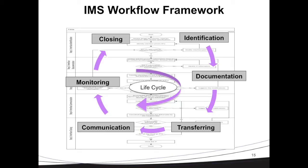Who is doing what, how many interface agreements are overdue, where are the bottlenecks. And finally, when all the agreements are closed and all the parties approve that all the requirements are delivered appropriately, we consider that interface agreement closed, and finally the interface point closed.